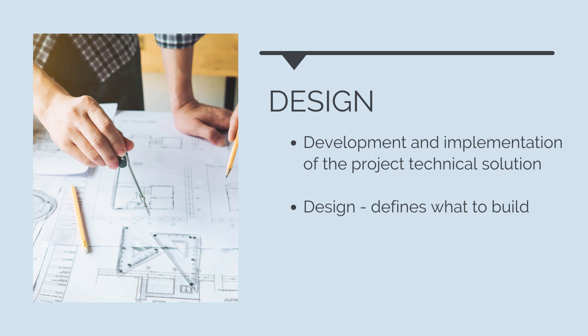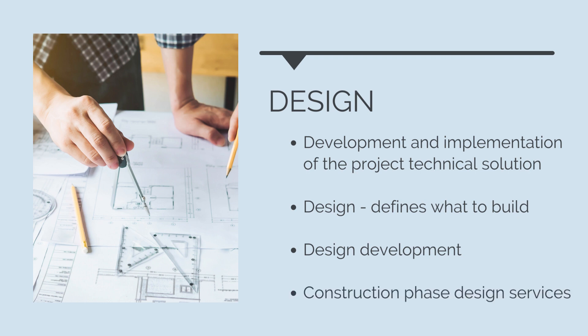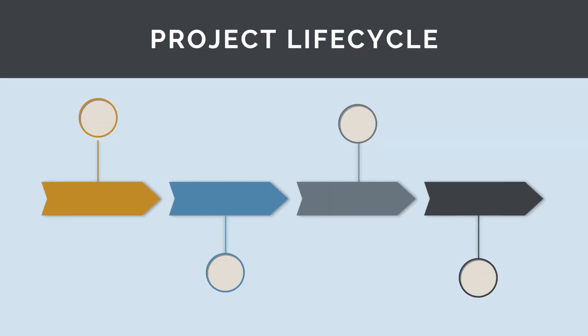Design management covers both design development, where the project technical solution is developed so that it fulfills the client and stakeholder requirements and is practical to build, and construction phase design services, where design changes are managed and tracked through the construction phase. Design management is used across the entire project lifecycle.